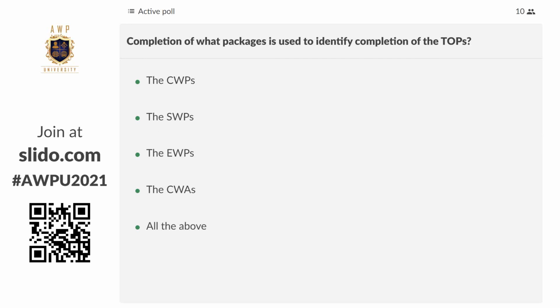The SWP, or the system work packages, they are subsets of turnover packages. They are tied to execution of IWPs for the prerequisite and the timing of execution of the IWPs. They are also tied to the CWPs as to when they execute, so that is a viable answer.